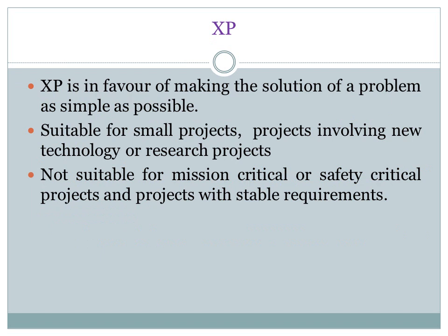Now, XP is in favor of making the solution of a problem as simple as possible. It is suitable for small projects, projects involving new technologies, or research projects, and is usually not suitable for mission critical or safety critical projects and projects with stable requirements. So, it helps in evolving the requirements, or in cases where requirements are not so clear, XP can be employed.